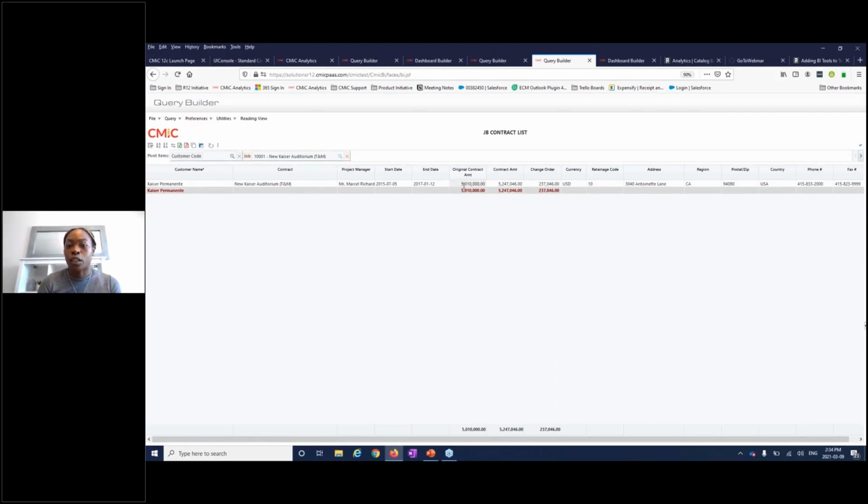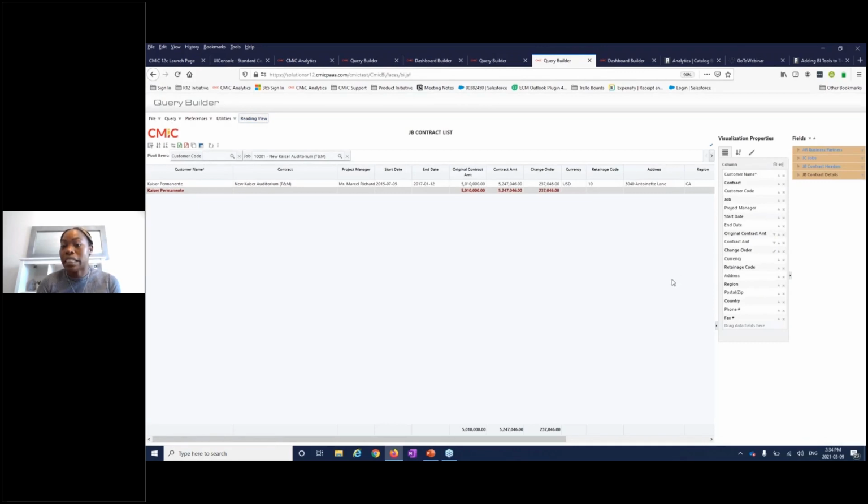Then what we have here is your original contract amount and then your current contract amount. This is my demo database, but when it comes to your original, that would be your initial scope, and then your current would be your scope with any changes that I would typically predict would be done through a change order, which then would facilitate through to an OCO. So with doing so, I had these two values already available within my JC job business area. That folder had all that information.